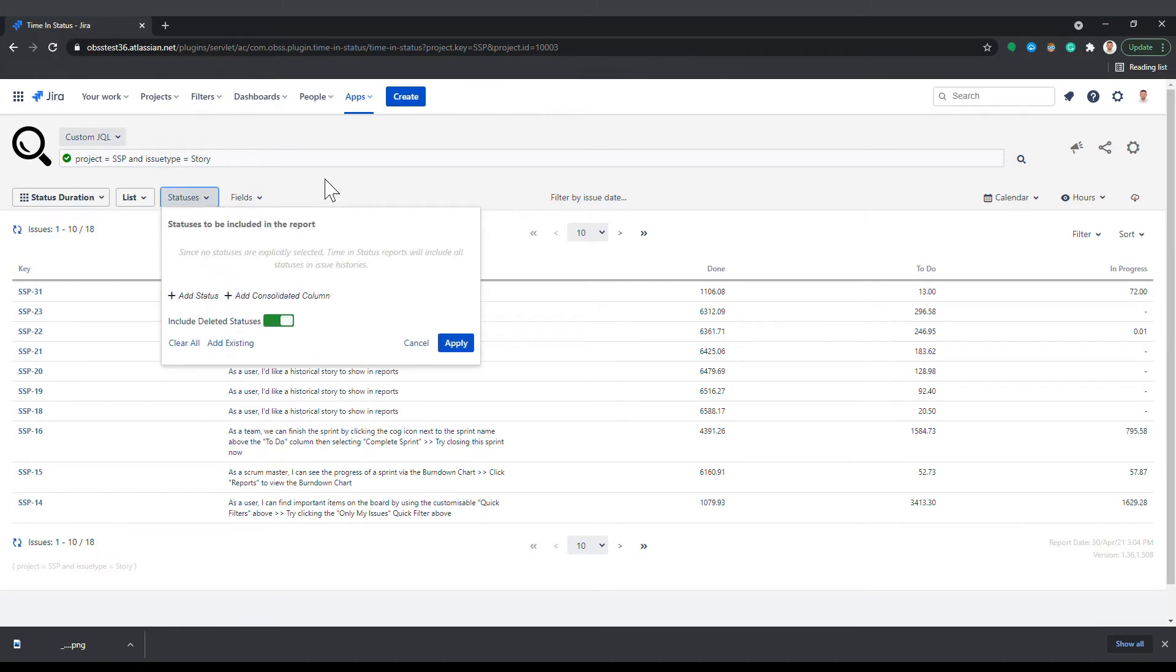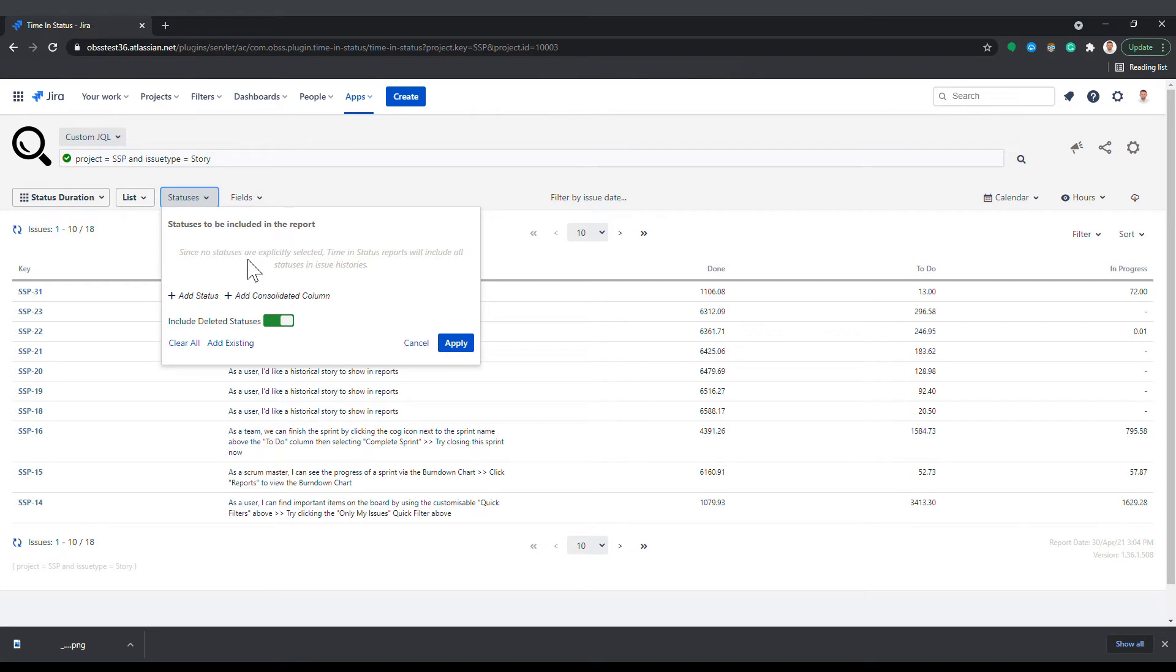If no statuses are selected here, timing status will include all statuses it sees in selected issues histories and show them in the order it encounters them during processing.